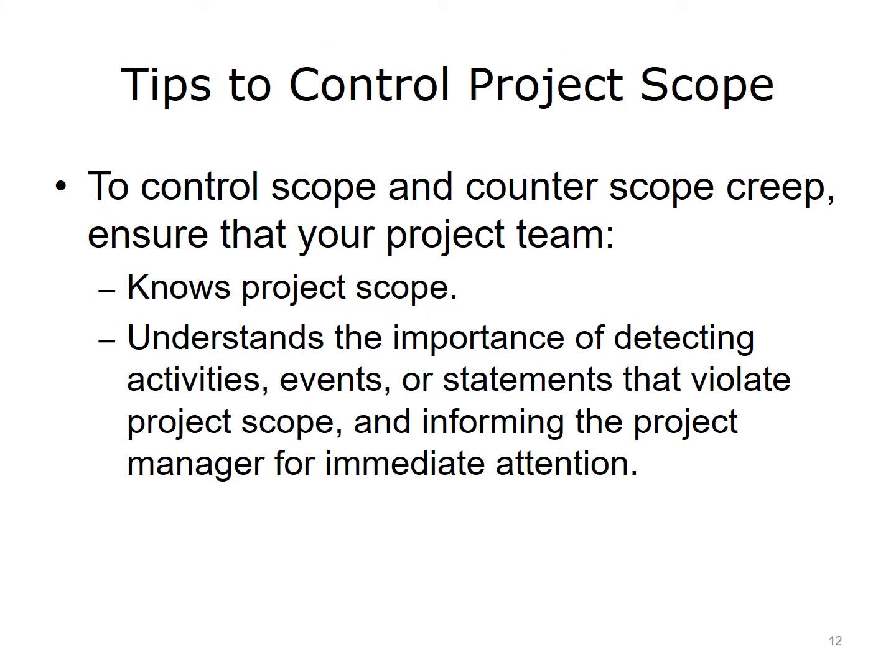The best way to control scope creep is to educate your team and engage them as lookouts for it. If they are not alert, they can easily acquiesce to some small request or leave an assumption unchallenged that can have ramifications down the line of your project. For example, a customer may casually mention that the system will update the database in real time so that it is always current. If this assumption is not true, you or your team members must speak up. If such comments remain unchallenged, they can become de facto requirements, and before you know it, you have gone beyond the scope of the project.